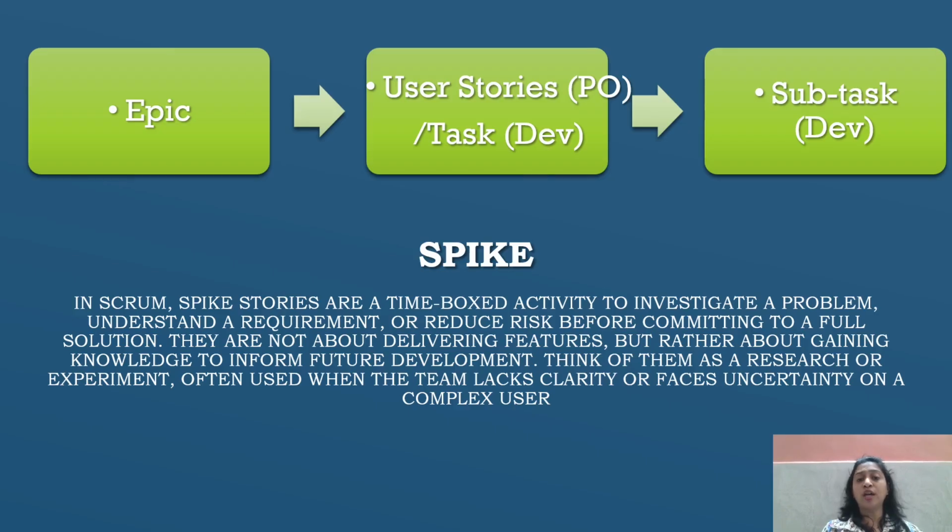In that epic, we have those user stories which we can convert into subtasks and try to resolve, making them research, POC kind of things, and we can get the information as early as possible. Okay, this is called the spikes.